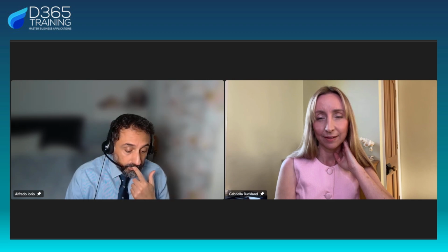So thanks for reminding me of that, because in a project to deliver business applications, we work with sometimes tens of users, hundreds in larger projects, and they all need learning, right? However, it's not very cost effective to put 200 people over 20 classes. It's not cost effective for the client. It's going to be time consuming. So train the trainer, right? We train the right person who can then share knowledge inside the organization.